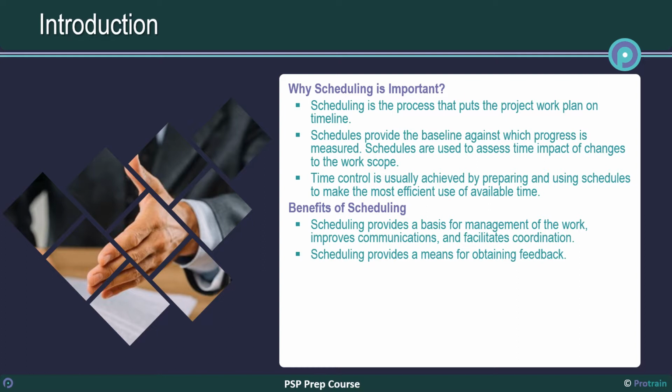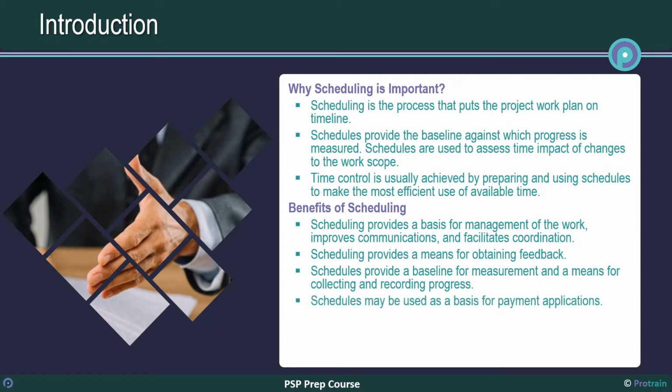Schedules are good motivational tools providing intended work plans to those having to perform the work and reporting progress against them. Schedules provide a baseline for measurement and a means for collecting and recording progress. Budgets, costs, and resources can be integrated into project schedule activities, providing a basis for measuring cost as well as time performance. Schedules may be used as a basis for payment applications supporting work completed. Critical path schedules are used and relied upon by courts for amending contract completion dates. When projects are faced with significant cost and time overruns, schedules are used as analytical tools to support assessments of labor efficiencies resulting from compression or extension of time, congested work areas, and disruption to planned work.